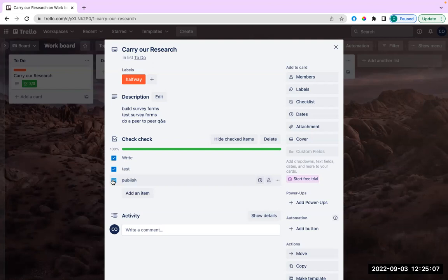Don't forget that a card can be a task. A card can be anything. Okay. Now let's say your card is a task. You have a task list or a task on your card. Now this task is a goal that you need to achieve. So you can as well break this goal down using a checklist. So whenever it's done, you click it and it's done, and it shows that you've done that part. And until you achieve all the minor goals to sum up to the overall goal. That is how the checklist works. Okay, and we can as well delete them too.